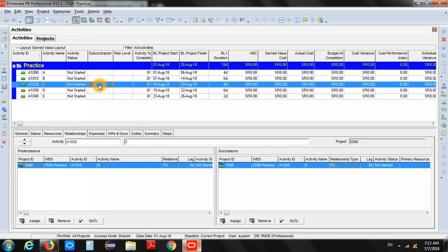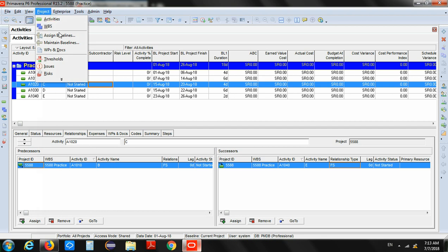Okay, so once you have developed your schedule, and let's say you want to finalize this schedule, you just want to move on with this schedule. Again, in this video we are not focusing on budget or expenses or resources. We are just focusing on the schedule itself. So once the schedule is done, the last step you will do to finalize your schedule is to make the baseline for this schedule.